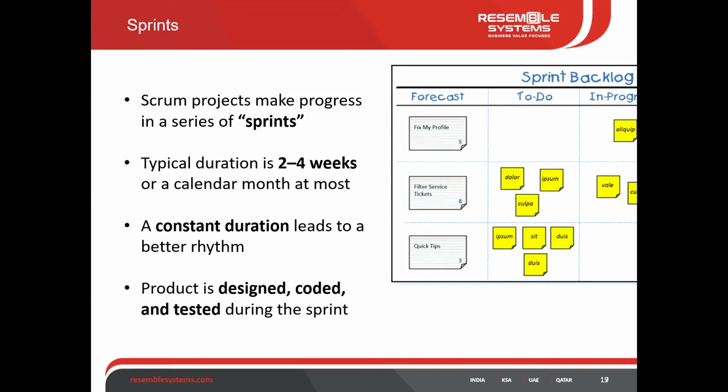So what I'm actually doing is, if I have a project or a delivery for 6 months, I will convert that into small sprints, sprint 1, sprint 2, which has its own deliverable with its own priority for the business, so that they can roll out that feature maybe within 1 or 2 months. And the typical duration for a sprint is 2 to 4 weeks that I can design based on my complexity.